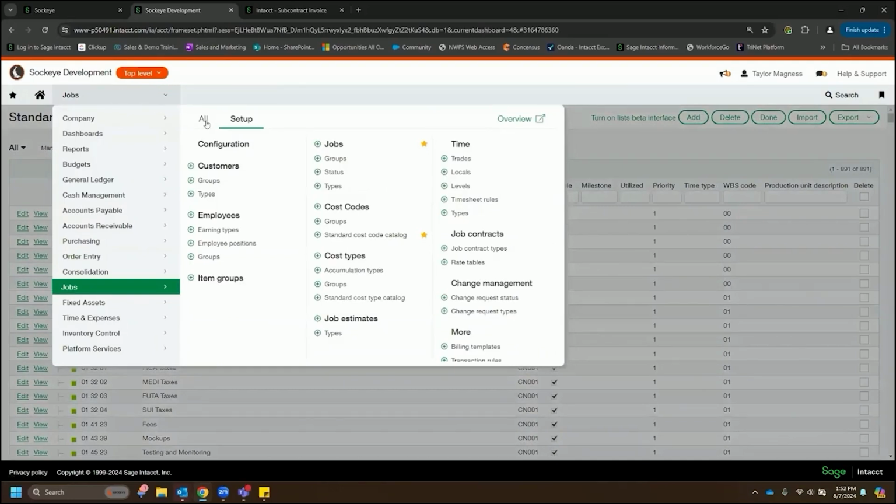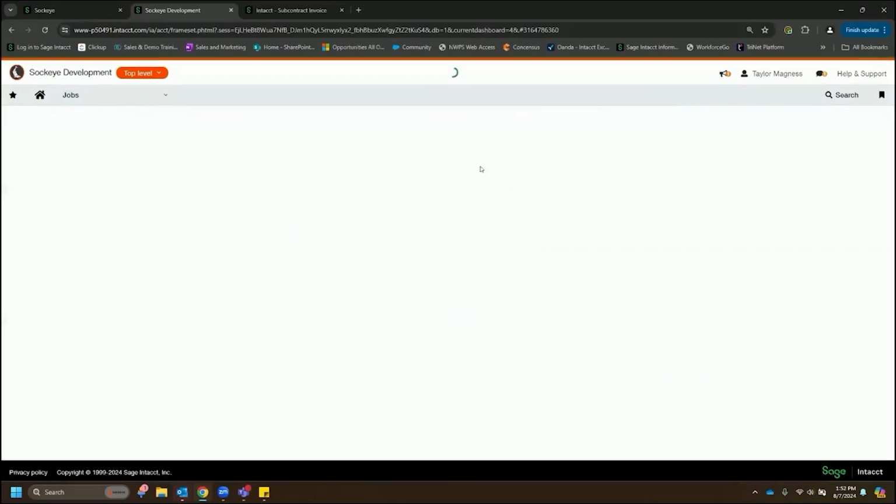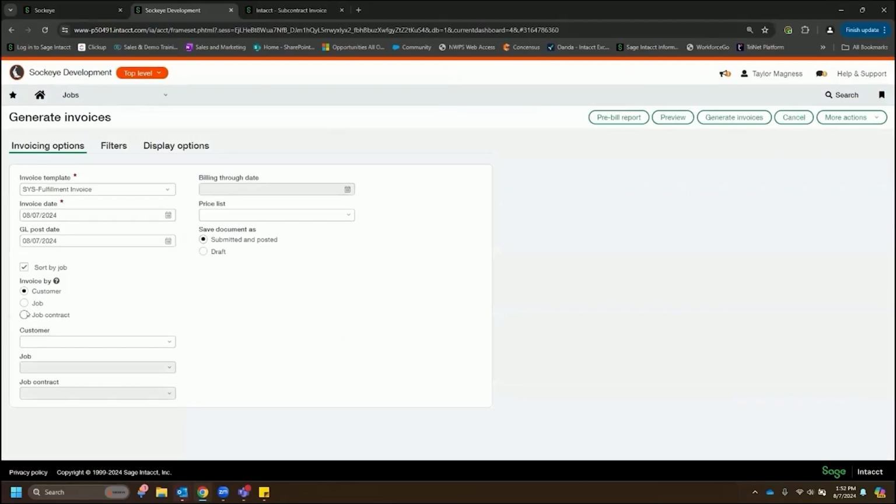And the last thing within this section I'll hit on is we can use this generate invoices function here to pull together a draw request. So we're using functionality that in a lot of cases is used for time and materials billing, but we are building it out and using it in a way that we can pull all of our costs that we need to draw on some of our finance. And so in this case, I do need to be at my entity level here.